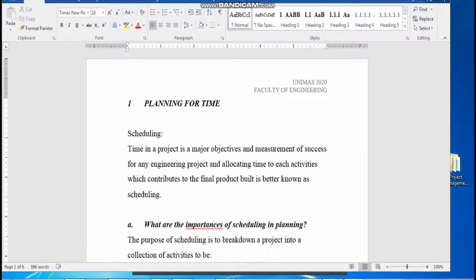This is the explanation for the assignment. You will need to do your work breakdown for 12 to about 15 major activities for any project of your choice. Then you're going to break it down into smaller components, into a maximum of 3 layers, and from there you're going to do your resources plan, okay?